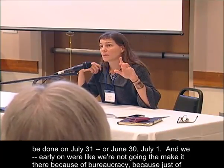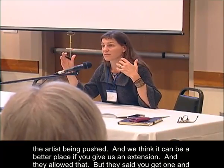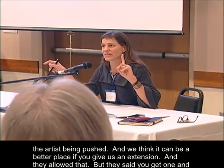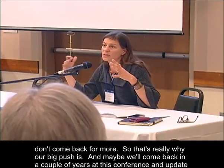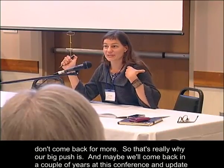Early on we said we were not going to make it because of bureaucracy and the artist being pushed, and we thought it could be a better project if they gave us an extension. They allowed that, but they said, you get one, and don't come back for more. So that's really why our big push is. And maybe we'll come back in a couple of years at this conference and update you.